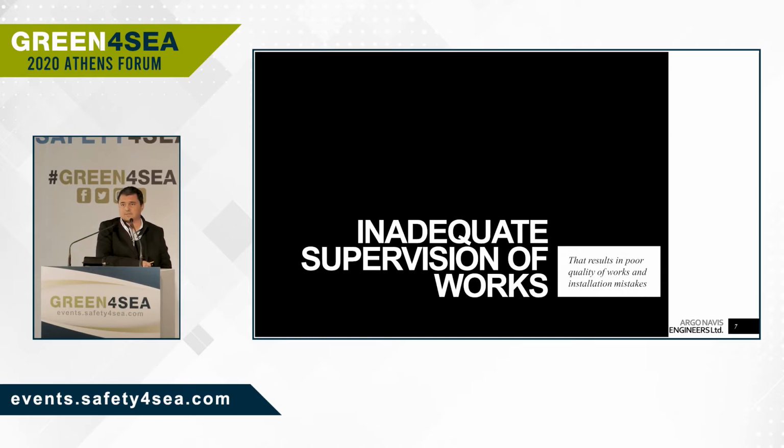The problem is that we have a lot of jobs taking place simultaneously. Actually, we were expecting that. And the shipyards have a lot of jobs, they do not have enough people, and that means delay, and delay always has an effect on the quality. So we need to have a proper supervision. But unfortunately, in most of the cases, there is no supervision of the works at all. This results not only in poor quality, but in installation mistakes that may affect the proper operation of the system.